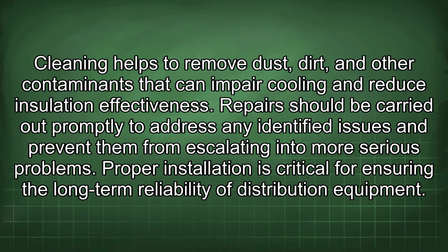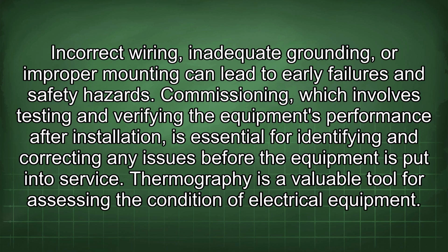Proper installation is critical for ensuring the long-term reliability of distribution equipment. Incorrect wiring, inadequate grounding, or improper mounting can lead to early failures and safety hazards. Commissioning, which involves testing and verifying the equipment's performance after installation, is essential for identifying and correcting any issues before the equipment is put into service.